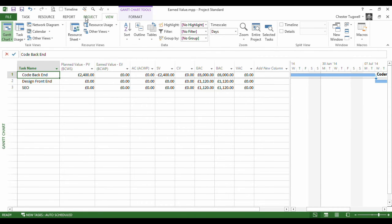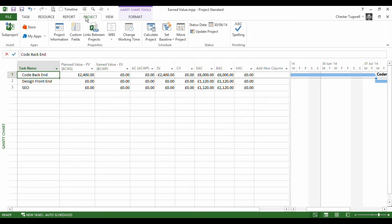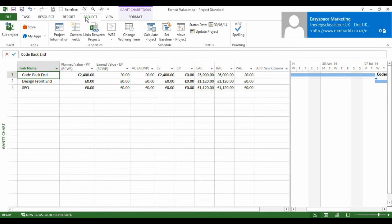Now the next thing you need to know about the earned value calculations is they're always based on a status date. Now the status date is by default today's date. So it would do its calculations up to today's date, but you can change the status date.